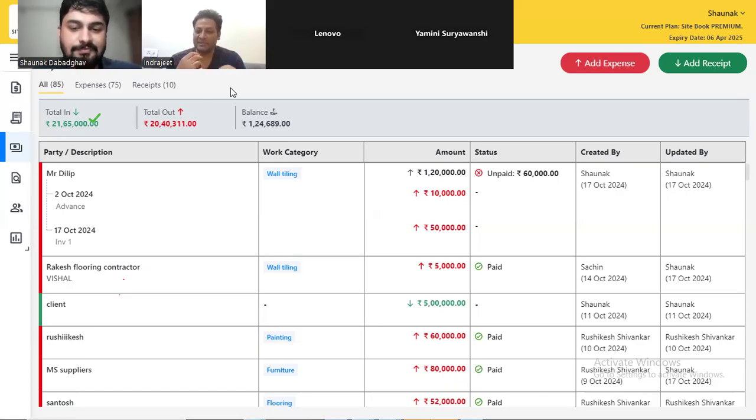When I'm saying estimation, it's about its accuracy, about quantity, the right items pulled into the estimate, correct quantities and correct rates. The second most important thing is you should be aware of the rates. What are the prevailing rates? What are the brands for that particular material or raw material available? What are the types? Within interiors, there are an infinite number of materials, so that is a major task for them. If you know everything about these things, then your estimate would be right. Then you add your profit markup and then you commit to your client.